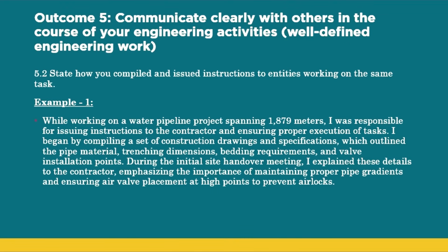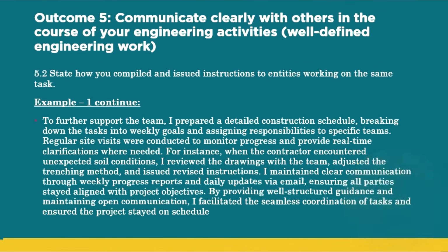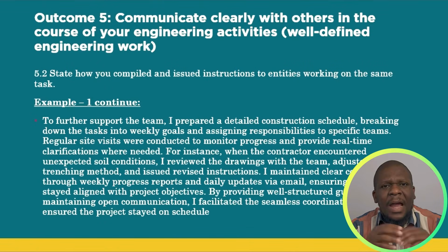I emphasized the importance of maintaining a proper pipe grading and ensuring air valve placement at high points to prevent airlock. So we are basically explaining how we issued instruction to every team member, whether within your team or other entities. To further support the team, I prepared a detailed construction schedule, breaking down the tasks into weekly goals and assigning responsibility for each specific thing.